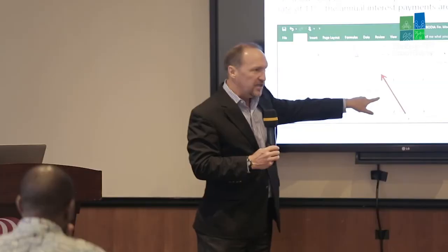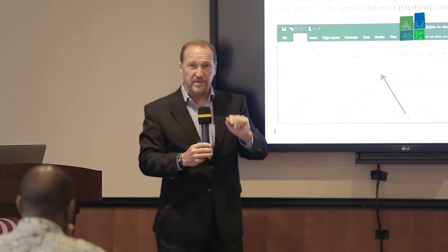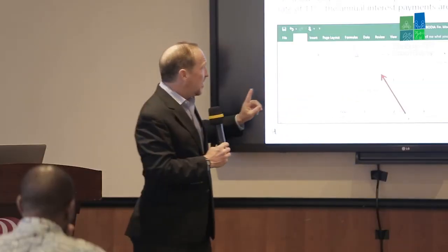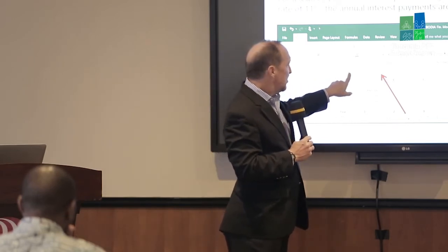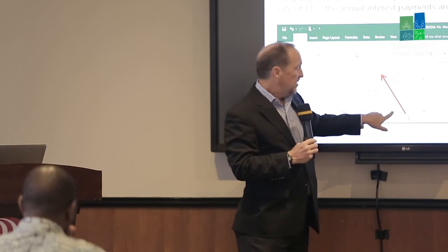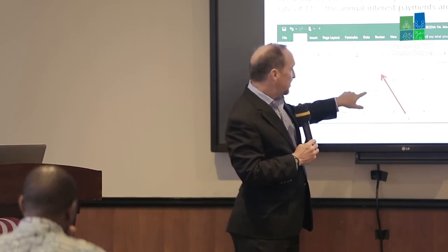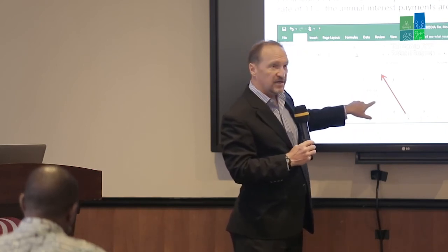It takes only 2 minutes to type in loan amount, that's present value, that equals 10 million. Interest rate, that's R, that equals 11%. Takes a little bit of time. Here I am calculating the interest payment for the second year of a loan of $10 million at 11% over 6 years.